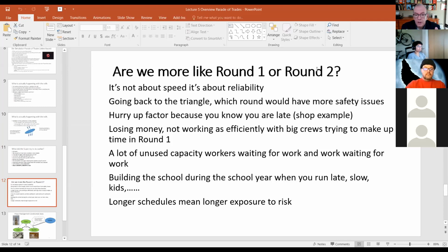Perhaps you've got enough resources that maybe you could do 4 rooms during a week. And then when something goes south on you, you're still good. You've got a little bit of buffer built in, but as soon as you've got that buffer, you work at trying to reduce it till you have confidence that you can do it in that time period without the buffer. And Lean doesn't work just in time, it works to the most responsible time, which means that if this week's lab will be talking about material deliveries and that sort of thing, you're thinking about, well, when is the best time to get materials delivered?